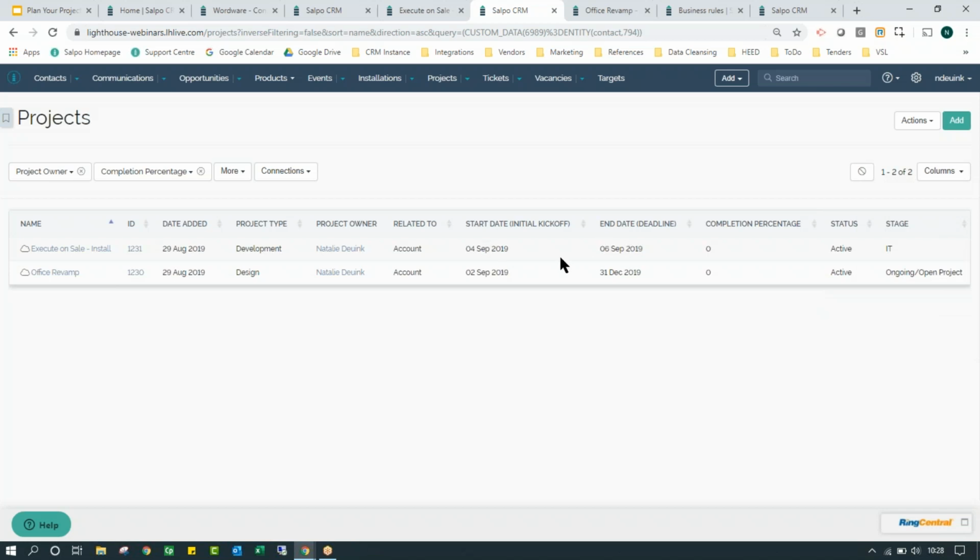but maybe it ended up taking me 3 days. And then maybe I noticed the next time it's taken me 3 days as well, but I'm only estimating and communicating to the client that it's going to take 2. So I'm always falling behind on that one. So this would be a great visualization for the team to say, actually, if this typically takes us 3 days, we need to start quoting 3 days, not just 2. So it's a great way of seeing that, because if our customers are told 2 days and then have to wait 3 for a response, you're letting the customer down.